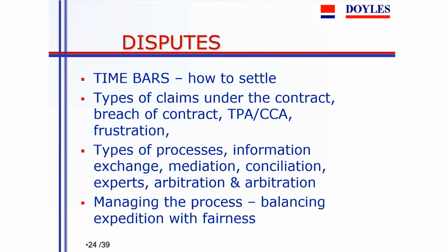And you ought to be careful to suggest that to the other side, to say, well, look, if we can't resolve it, if it's under a couple of grand, under 200 grand, let's just refer it out to an expert and then we can get rid of it. And you're trying to maintain the relationship while getting rid of the disputes.